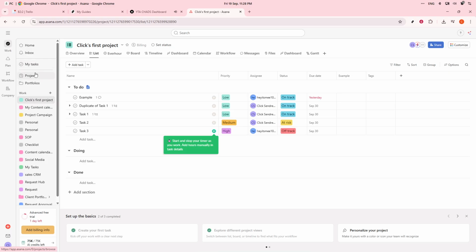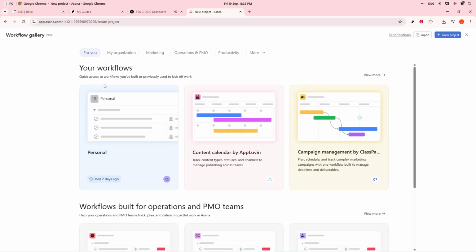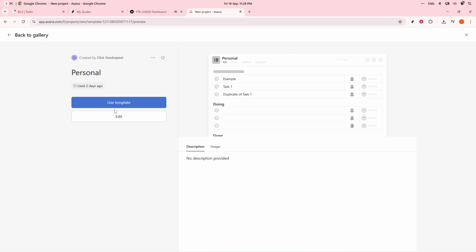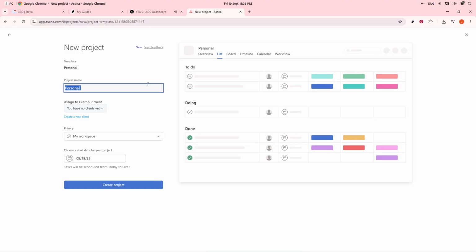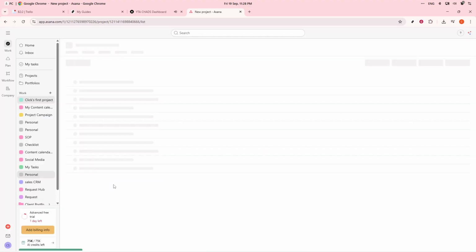You'll start by creating a new project. In Asana, you have the choice of using Board View or List View for your project. Board View offers a Kanban-style layout, providing excellent visibility across different stages of your workflow, while List View can also be effective depending on your preference. Once you've chosen your view, give your project a descriptive name, something like Sprint 1, your project name.